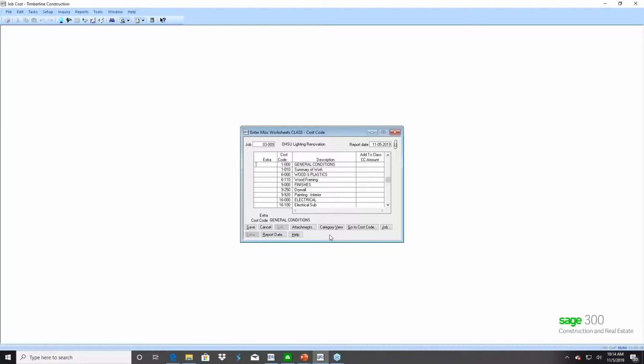All right, now, the entry. The job that you're entering the miscellaneous worksheet for has to have cost codes set up on it prior to going in to enter miscellaneous worksheet. And this is on page 6. It's the second important note. You can't add cost codes on the fly, and if the cost codes don't show up on the screen, you're not able to enter to them. So typically, you're not able to do this until maybe after you've imported your estimate in or entered your estimate in, because that will bring in all of the cost codes. And this is true even on a quick build job. If you're trying to enter a contract amount on a quick build job that you haven't done anything for, you're going to have to manually add a cost code to that job with setup cost codes, so that there is at least one cost code on the job so that you can get to the job button at the bottom of the screen.